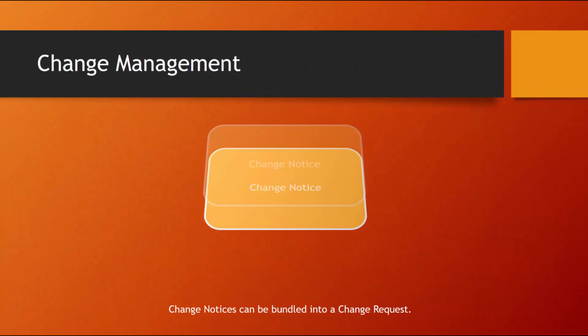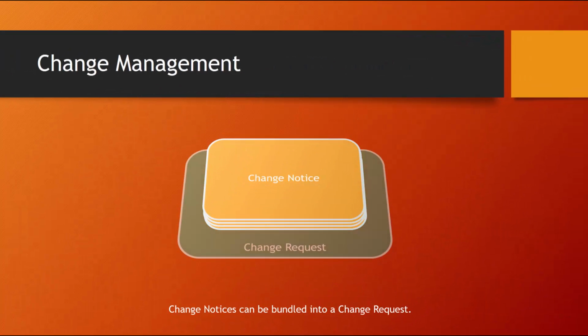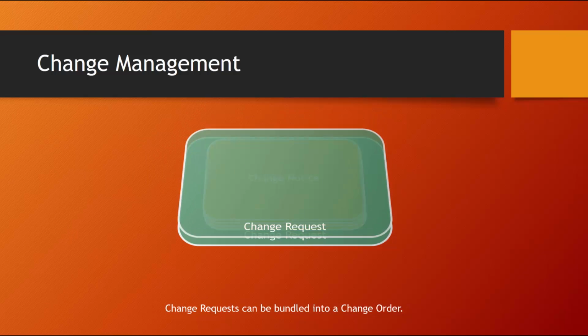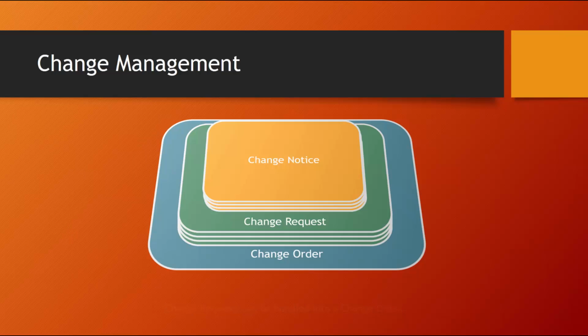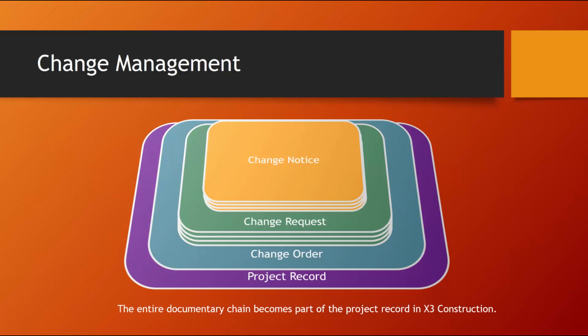Change notices can be bundled into a change request. Change requests can be bundled and formalized into a change order. The entire documentary chain becomes part of the project record in X3 Construction.